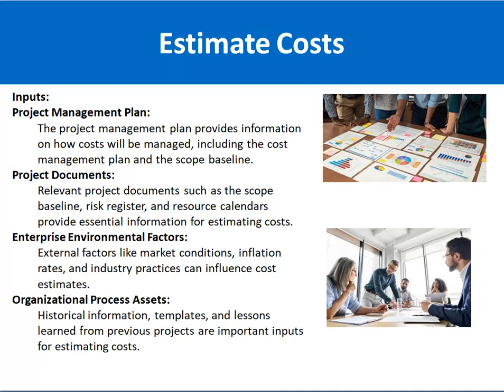There are some enterprise environmental factors also involved, for example market conditions, inflation rates, and best industry practices. They also influence the cost estimates. Next are the organizational process assets, which include historical information, templates, and lessons learned from previous projects. When we are estimating projects, we sit in a conference room and analyze the previous projects' data, historical information and templates. All of these are the major inputs for the estimate cost process.